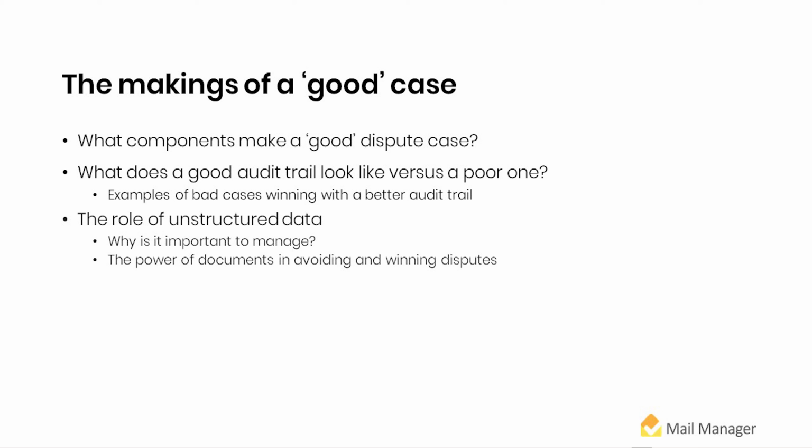So I do think, at least where I am, I'd like to see more uptake on records management and records production on the front end as well. So whether it's using more digital drawings and maintaining them, whether it's making sure that you have native formats of schedules so that proper scheduling analysis can be performed by experts, or whether it's just implementing procedures for your organization.